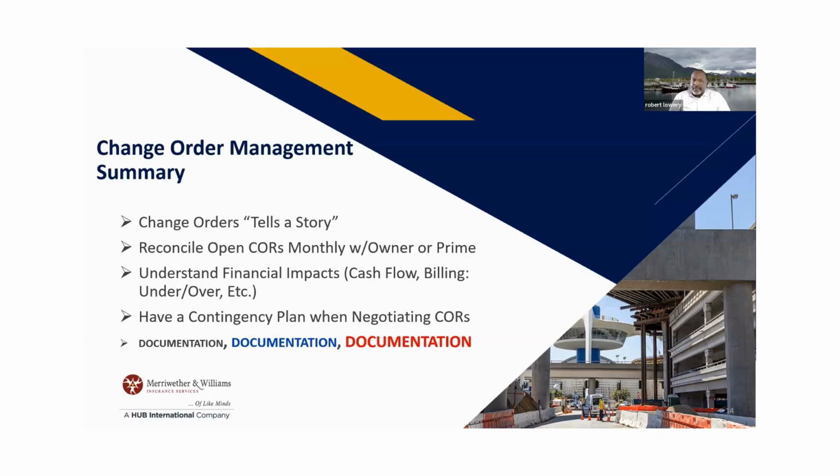That's how you make profit, when you can pad some of these change orders and it's not just a direct cost. So that enhances your fee or your profit. But I still keep that in the contingency plan until the job is totally done, because you might have to go in there and use that for a scope that you missed.